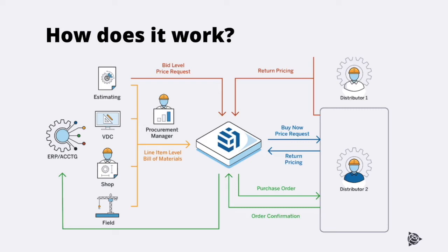So regardless of origin, once a bill of materials is created and handed off to procurement, Supplier Exchange supports the management of the BOM and reconnects with those same distributors again to get real-time project-based quotes to make informed buying decisions. It then continues utilizing those same distributor connections to facilitate the creation and submission of digital purchase orders directly into the distributor's ERP system. Those same orders, once confirmed, flow back into the contractor's ERP system, closing the loop on the workflow.